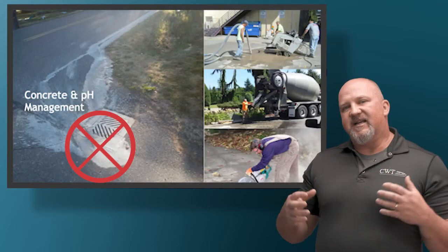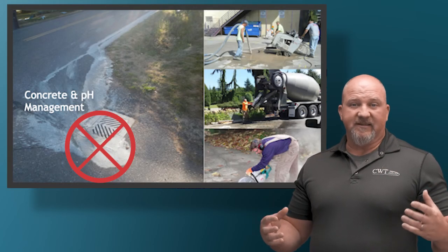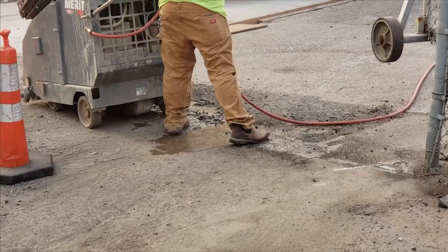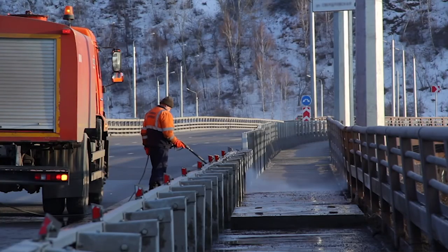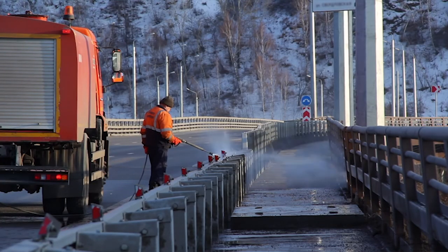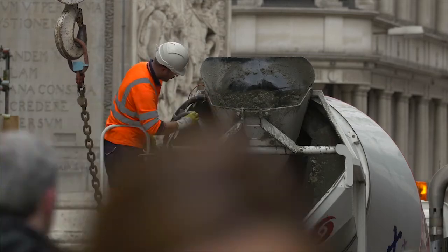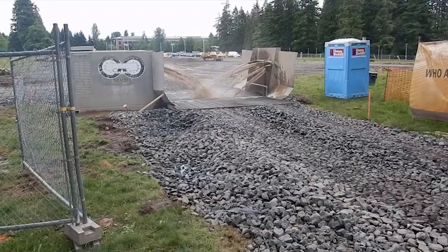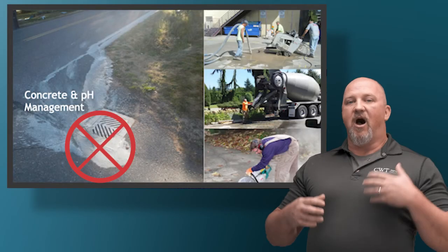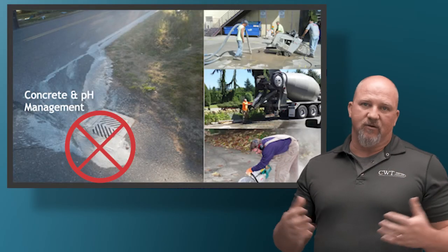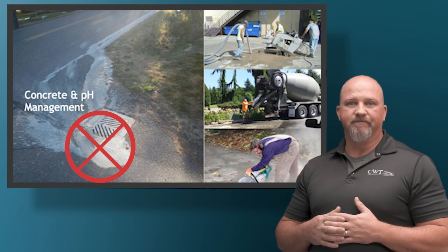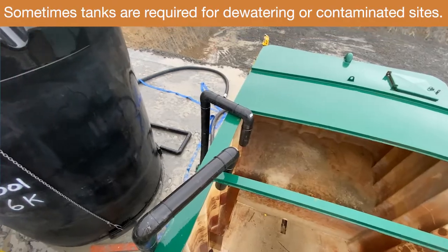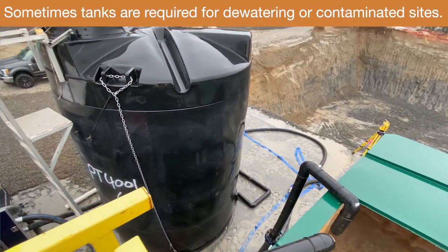We also really need to consider our process water management system. Process water generated from concrete washouts, saw cutting, pressure washer, or wheel washes are all process water. That is not stormwater and cannot be commingled. It must be contained and confined and removed from the piece of property or go through some type of infiltration system on that piece of property that won't pose risk to groundwater or stormwater moving forward. To help manage that, you may have to have a dewatering plan put in place or some type of management system, especially for concrete washouts.